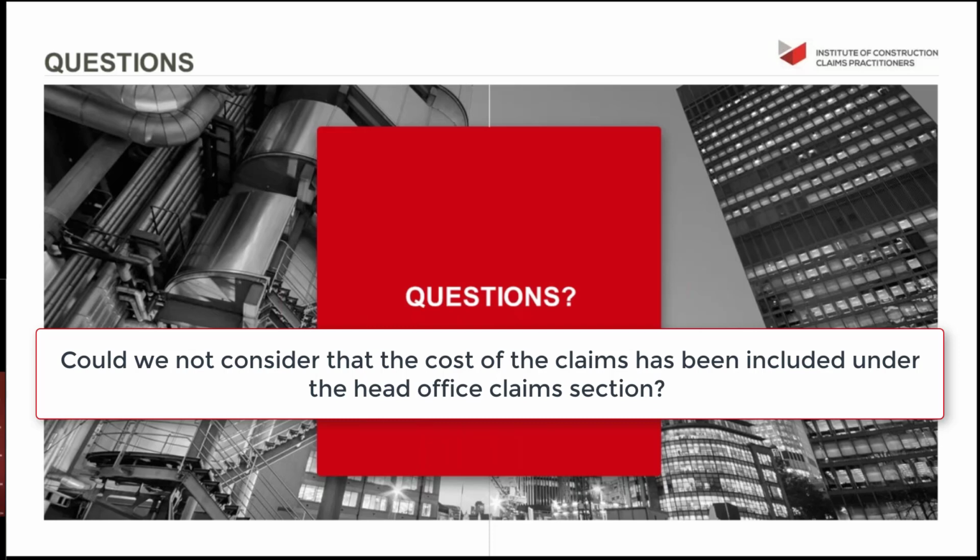I think wherever you include your claim costs, whether it's in the head office activities, which is sometimes recoverable under your overheads, or whether it's a specific head of claim for claim preparation costs or damages arising from the secondary breach that we spoke about, the risk is still that the contract administrator or engineer will say, hey, those guys that you have in your head office, your claims director, your commercial manager, how much of their time was spent putting together that claim that you've submitted? I'm not paying for that.